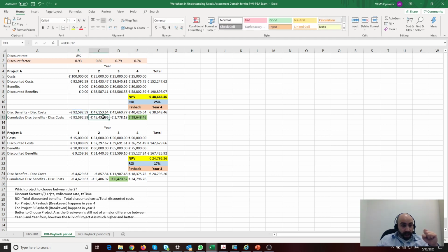But the second year, I made profit. And here's my profit. So I would take this one and add it to this one. So minus 92,592, I'm down. I added the profit of year 2. I get to, I am still down by minus 45,438.